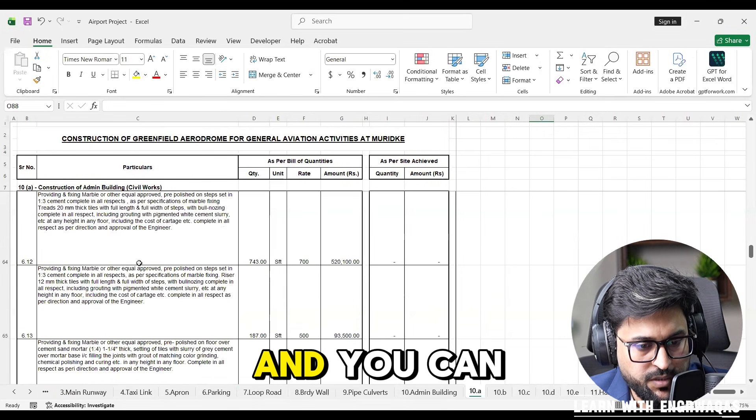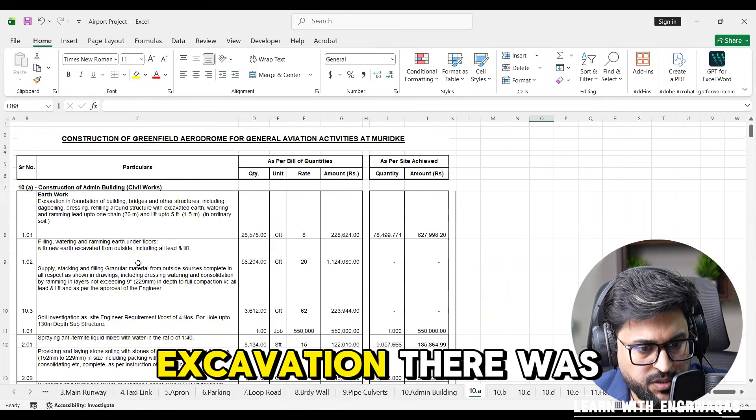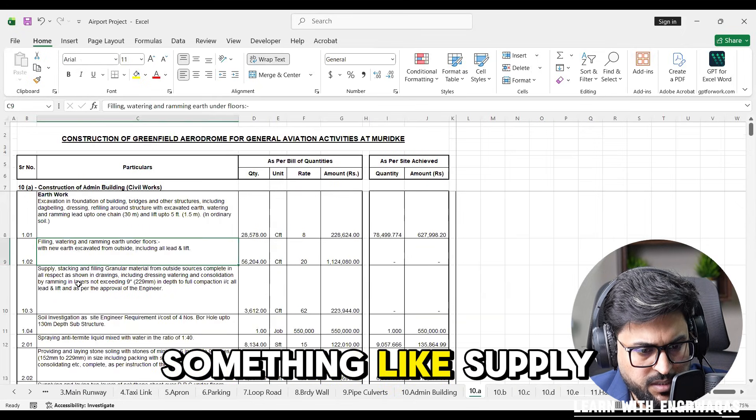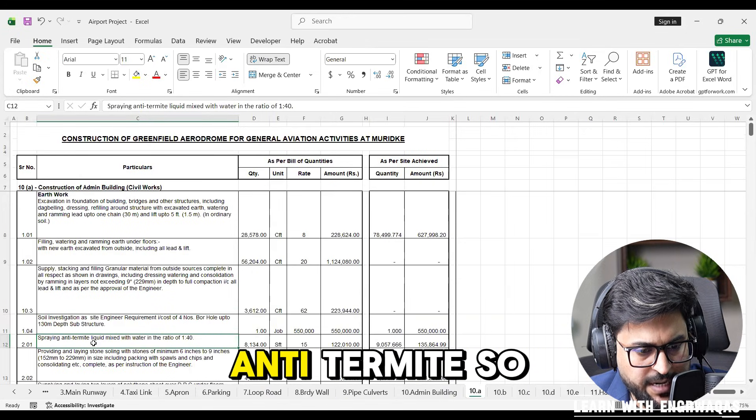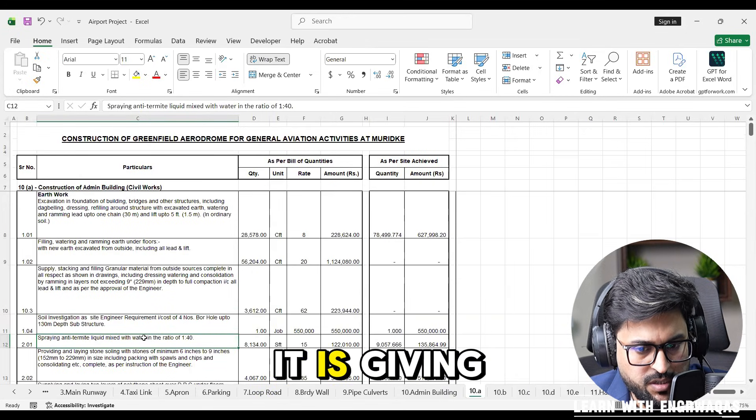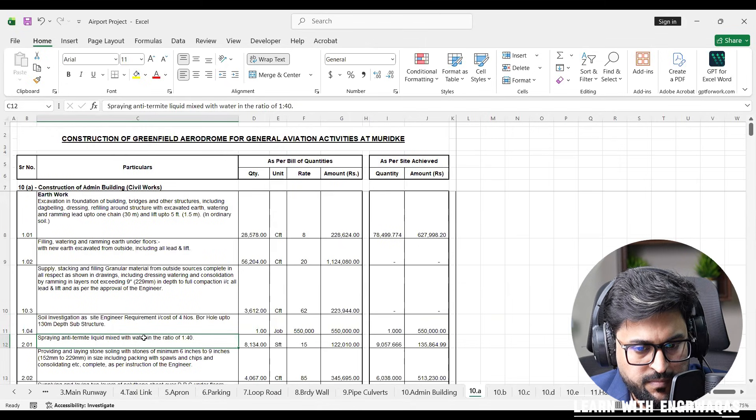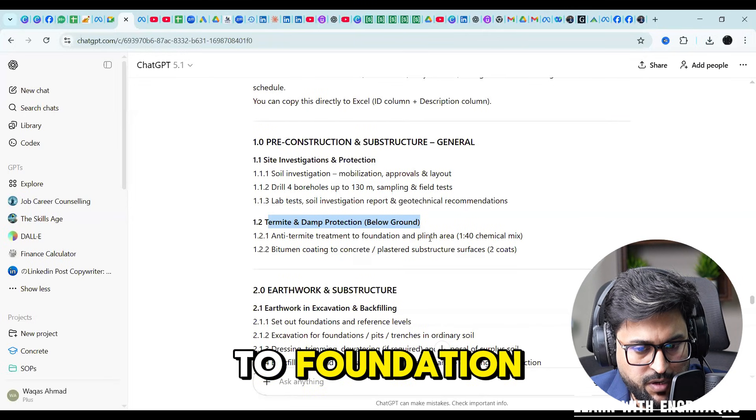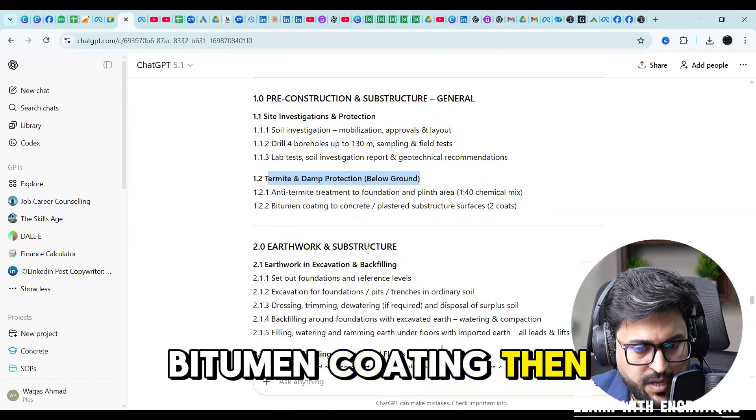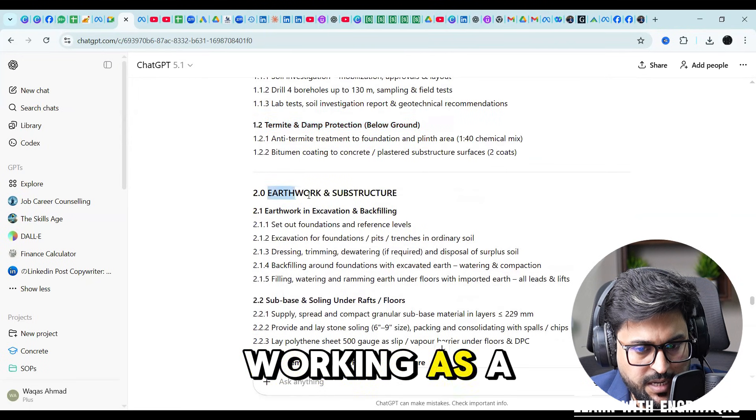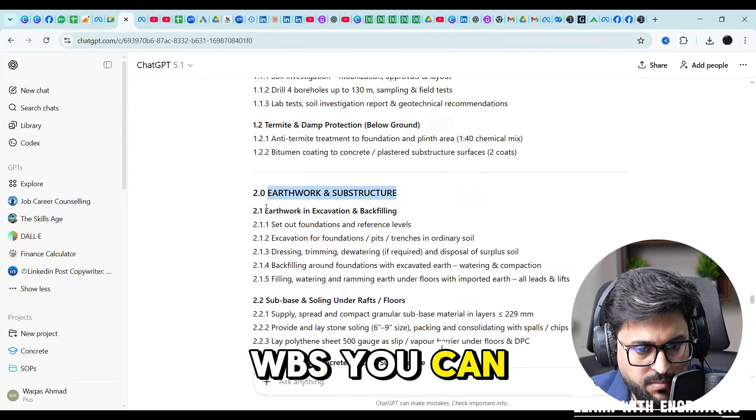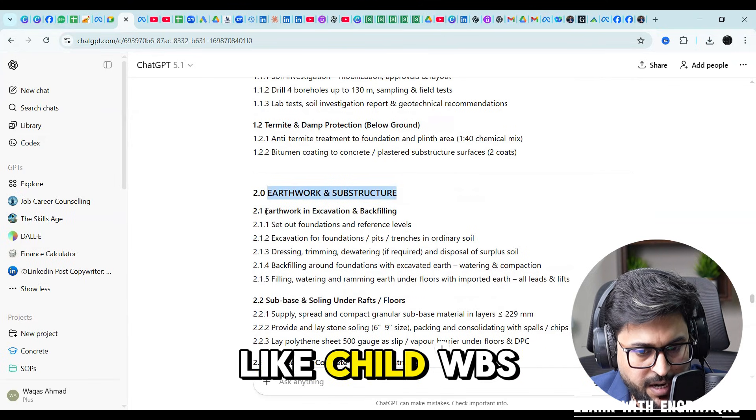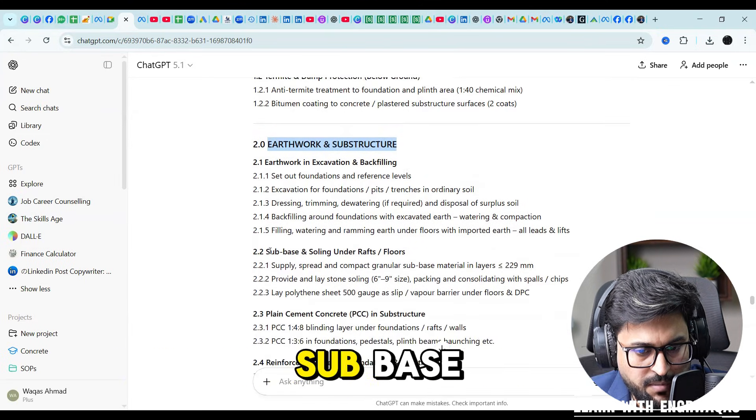Under excavation there was something like supply, stack, soil investigation, spray anti-termite. It is giving you all the things: anti-termite treatment to foundation, bitumen coating, then earthwork. This will be working as a WBS, then under that WBS you can make another WBS like child WBS earthwork in excavation subbase.